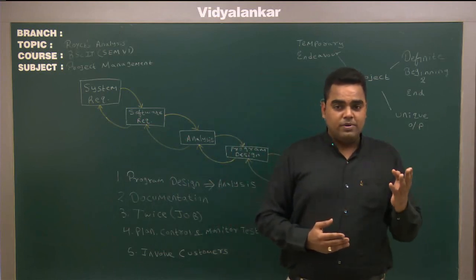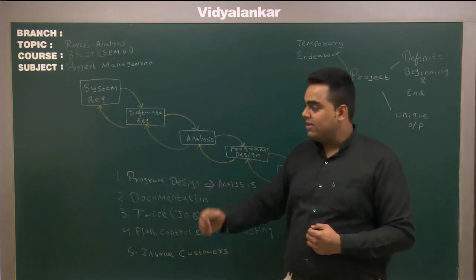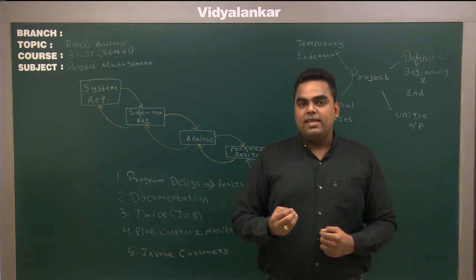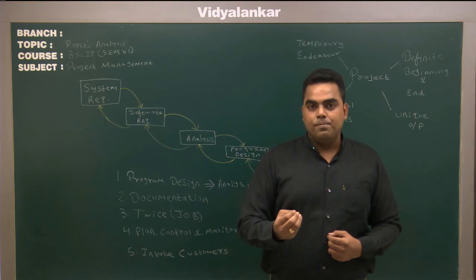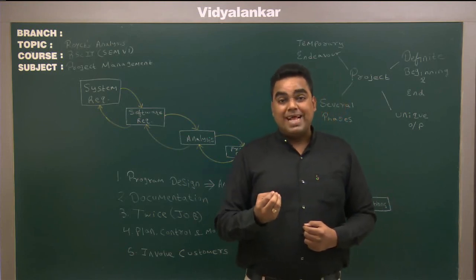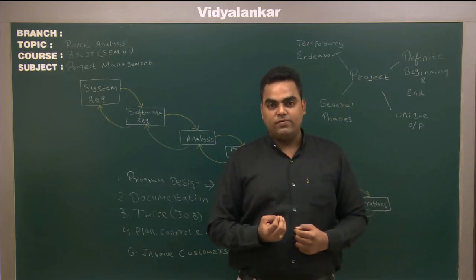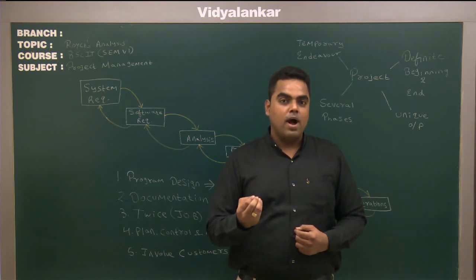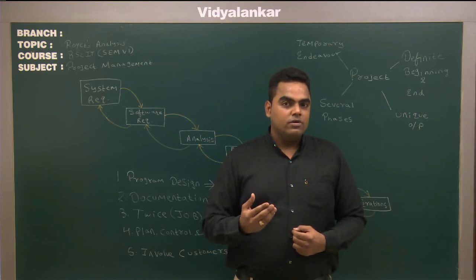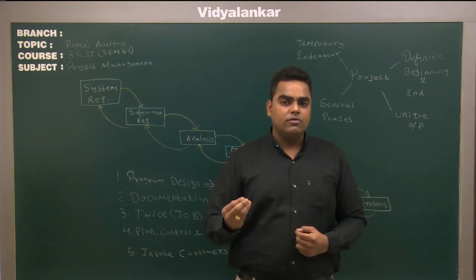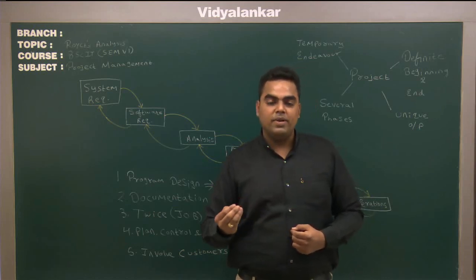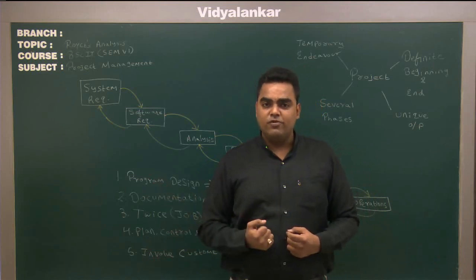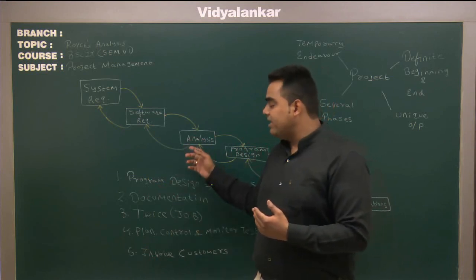After specifying the requirements from the developer side as well as from the client side, the next phase is the analysis phase. While developing the application, you cannot start directly coding. You need to first decide some parameters. For example, how much time will you require to develop that application — that is known as time analysis. Next comes how much cost will you require to develop the application — that is known as cost analysis. There are certain methods by which you can calculate the cost and time required, for example the COCOMO model. This kind of analysis is done in the analysis phase.